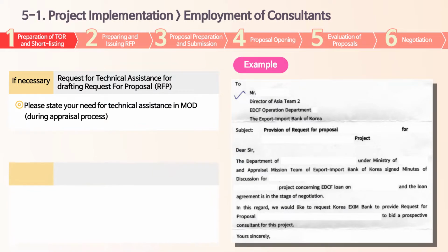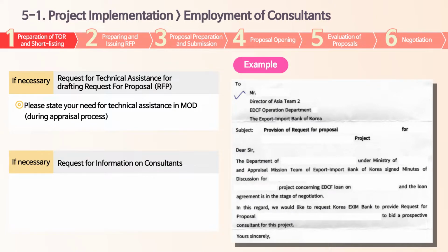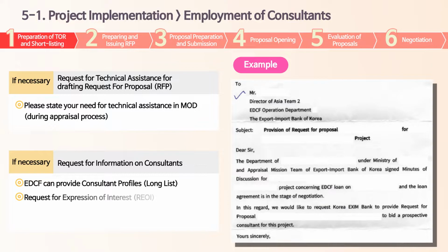In principle, PEA is supposed to employ consultants through limited competitive bidding among Korean consulting firms. You may be a little nervous to hear this, since you might have very limited information regarding the expertise of Korean firms, but you don't need to worry. If you send an official request for information on consultants, EDCF can provide profiles of qualified Korean consultants, often called